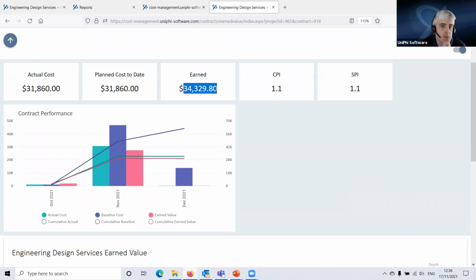Here we are, we've earned slightly more than our actual cost. Now, again, that might be a little bit optimistic, but that's okay. It'll probably go down when timesheets are submitted for this week. And so we're basically on cost and on schedule, maybe slightly ahead. Now, you would expect that when you rebaseline. So that's okay. We've got to see how it performs from here on in.